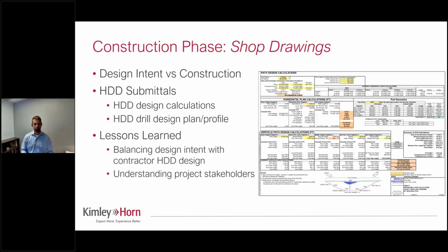So ultimately, they had 4 different stakeholders on the contractor side that were providing input into the shop drawing phase and into this final design. But unfortunately, they weren't all getting brought in at the right time. And so that added to some of the back and forth with the shop drawings. Again, if we would have had a workshop at the beginning, understood better how the whole contracting team was pulled together, we would have made sure that we could have had all the right parties in the discussions from the beginning.